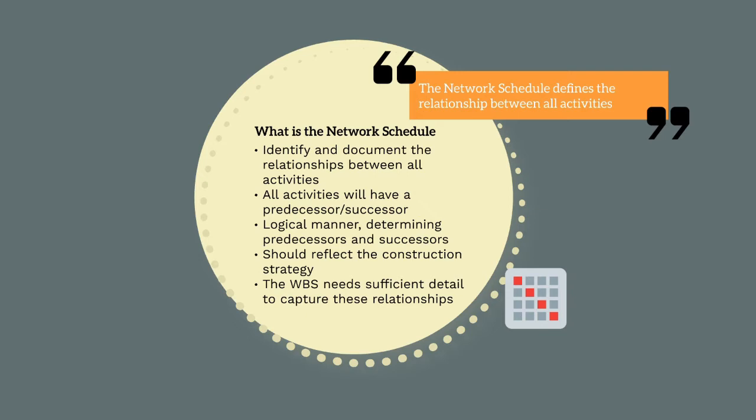Every other activity will need something completed before it so it can begin, and when it's completed, it will allow another activity to commence. This sequencing of activities is often referred to as the methodology, and it is a description of how the job will be delivered from the contract award through design, procurement, construction and commissioning, right up until the finished project is handed over to the client.